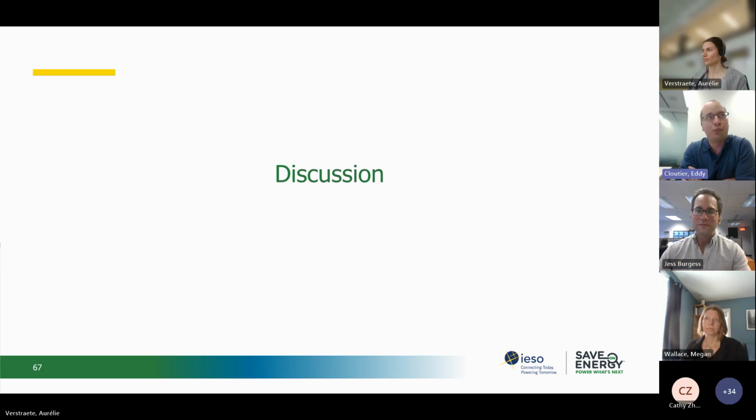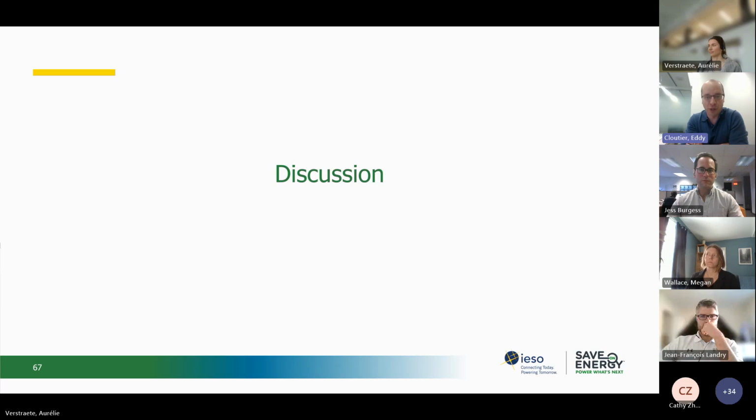Failed? I will not say failed. The challenge that I see when it's owner-led is usually it's a long process because there's less pressure to complete it. I mean, the people that will try to do the commissioning have a lot of other tasks, and recommissioning will maybe not be their first priority in that case.